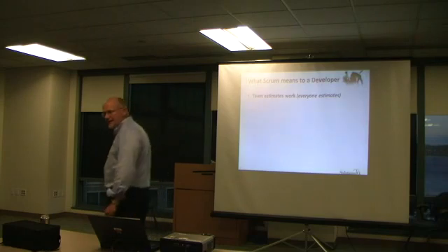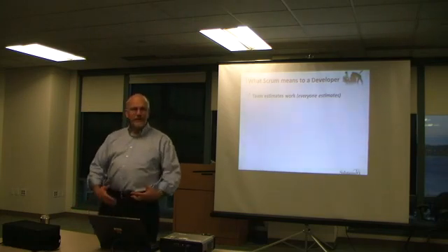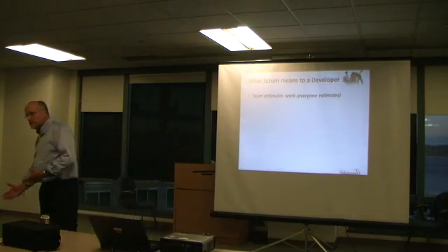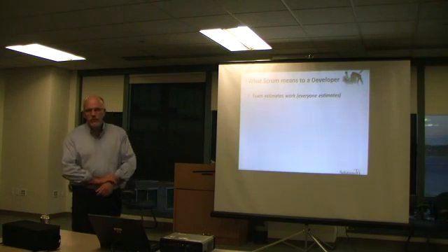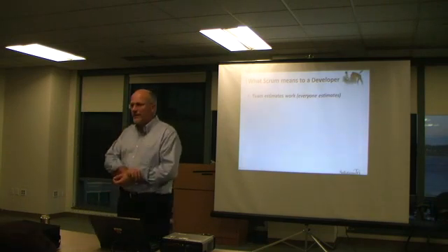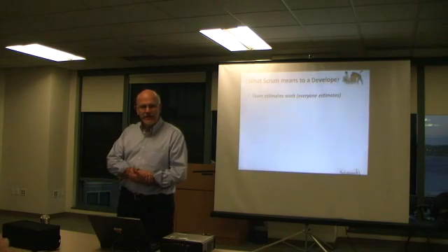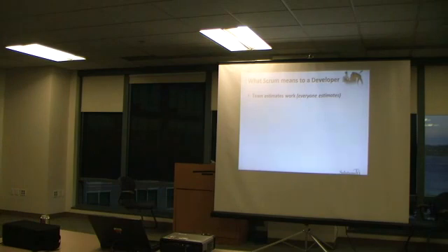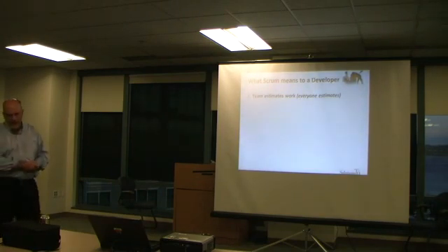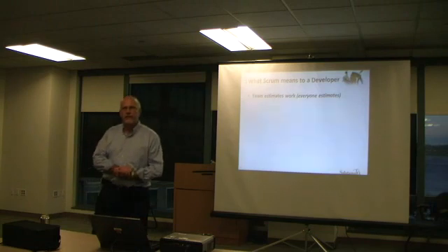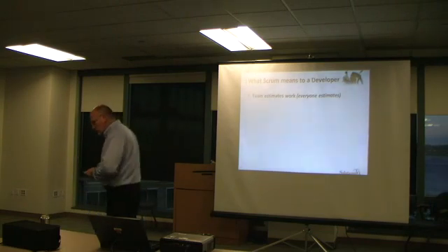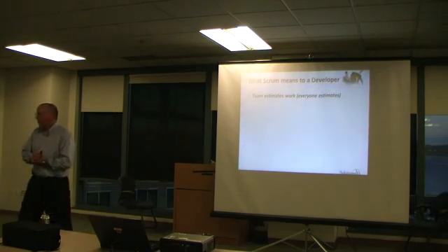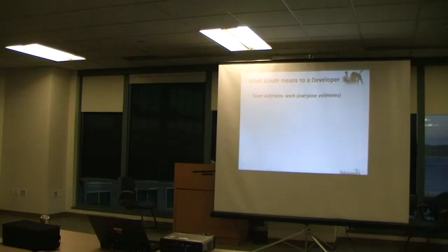Well, everyone estimates. That means you've got to figure out how you're going to do estimating. When's the last book or article you read about estimating? Be better at estimating. But there are cool ways. Affinity estimating, I called it proximity estimating the other day, is a very powerful process. We've estimated 300 stories in about 2 hours of affinity estimating. It's pretty cool. We helped the Microsoft game team estimate an entire year's worth of stories in about 3 hours. Check to see that your estimates are actual.